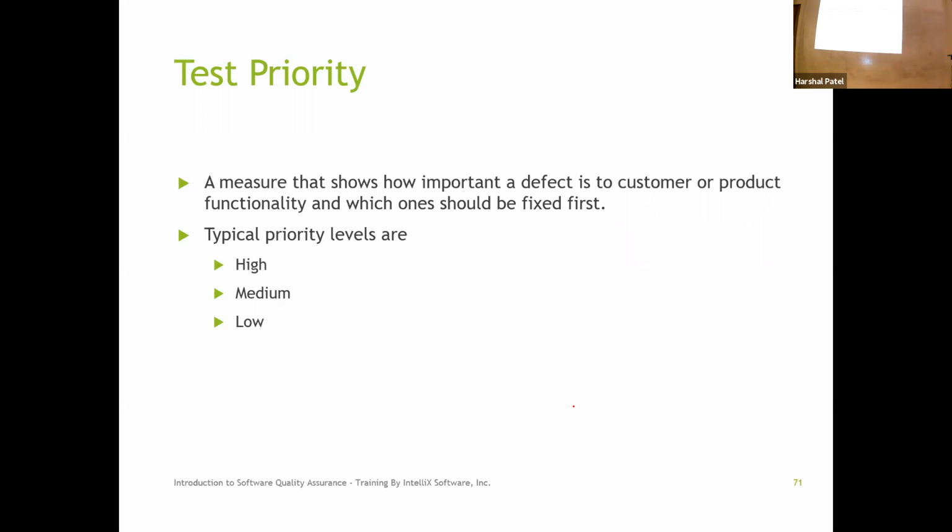So if the contractor comes in and says, hey, you have two choices, what do you want to do? I'm going to say the water has to work is my first priority. So I'll define those features to be implemented and tested as high priority, and the other ones, which I can live with if they're not there, will most likely be low. So when you define all those test cases, you also work with the business and ask which ones are high priority. Typically you take the guidance from the requirements: the high priority requirements are the high priority test cases. If the requirement is low priority, they're not going to be high priority test cases.